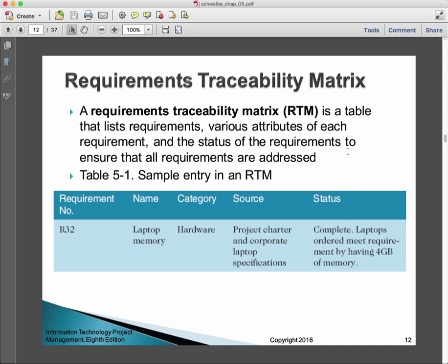But what if that code supports other requirements that compete with it, and when we change the code, we're going to break some of the requirements? How can we keep track of all that information? Well, in a very small system, you can keep a track of it in the analyst's head. In a very large system, people are tracking these with these requirements management applications, of which the smallest manifestation is this requirements traceability matrix.